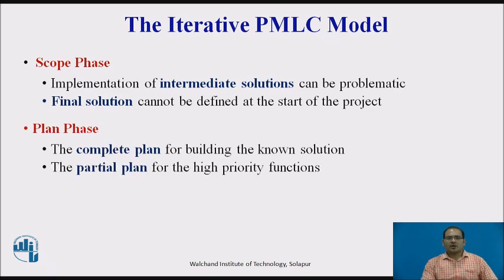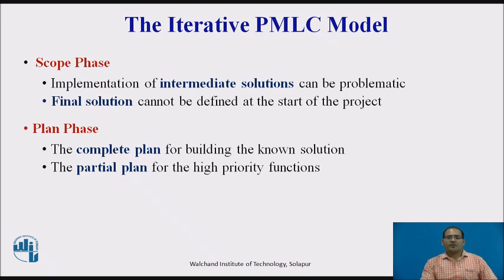Planning is done at two levels in an Iterative PMLC Model. The first is the complete plan for building the known solution; the first iteration in this plan may be of long duration in order to accommodate building a production version of the entire known solution. If this iteration will be too long, you might consider using a tool to model the solution instead. The second is the partial plan for the high-priority functions, where you begin by prioritizing the functions and features in the initial requirements.